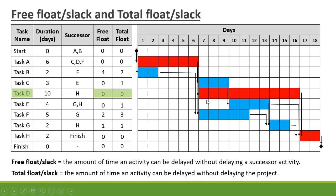Task D is one of our activities on the critical path, so it has 0 free float and 0 total float. Task E has 0 free float, and is connected to G, which connects to H with 1 day of float. So the total float on Task E is 1 day before it will have an impact on the project.